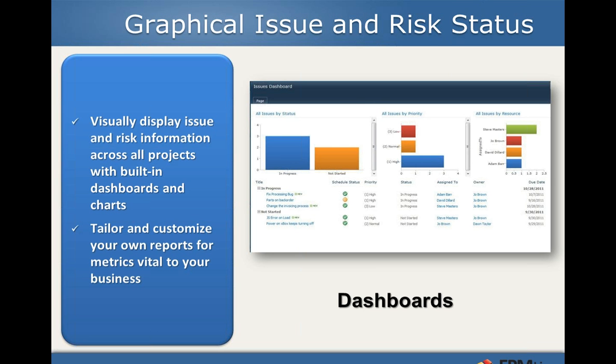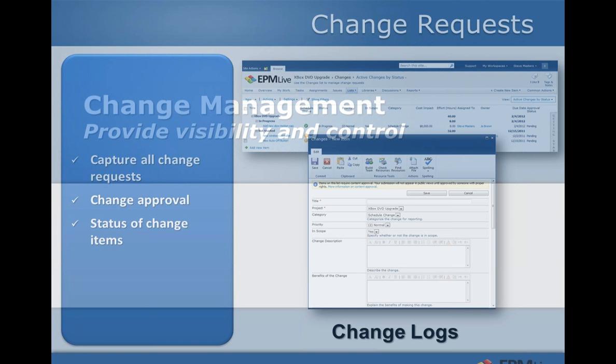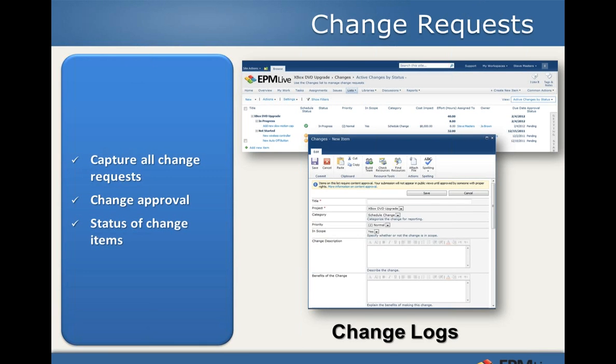And you can extend that same concept to the whole concept of change management. I mean, change management is a whole process and methodology in and of itself, but the idea here is to be able to log and capture change requests as they come into projects. One thing about managing projects, it's really about the management of change. Change will occur, and so the key here is to capture them, to put them through change approval, and status those items.